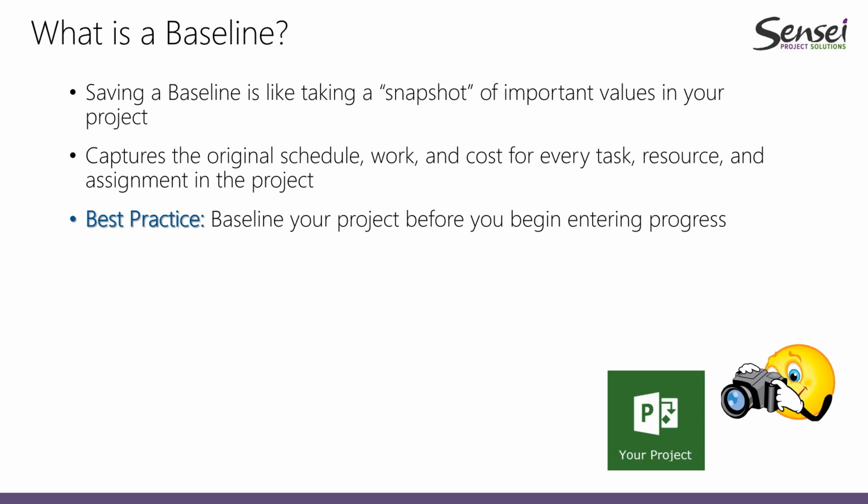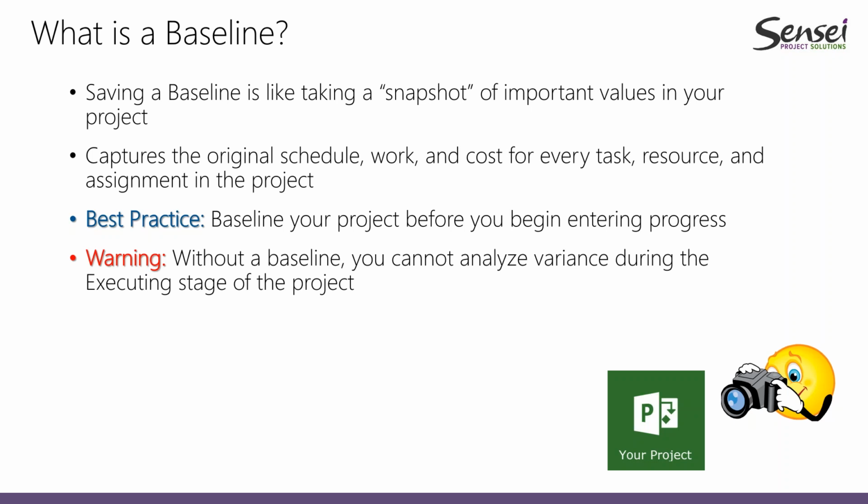There is also a warning: without a baseline, you are not going to be able to analyze any variances when you are executing your project, because without a baseline I do not have any information to use as a reference to track my project and compare it against.